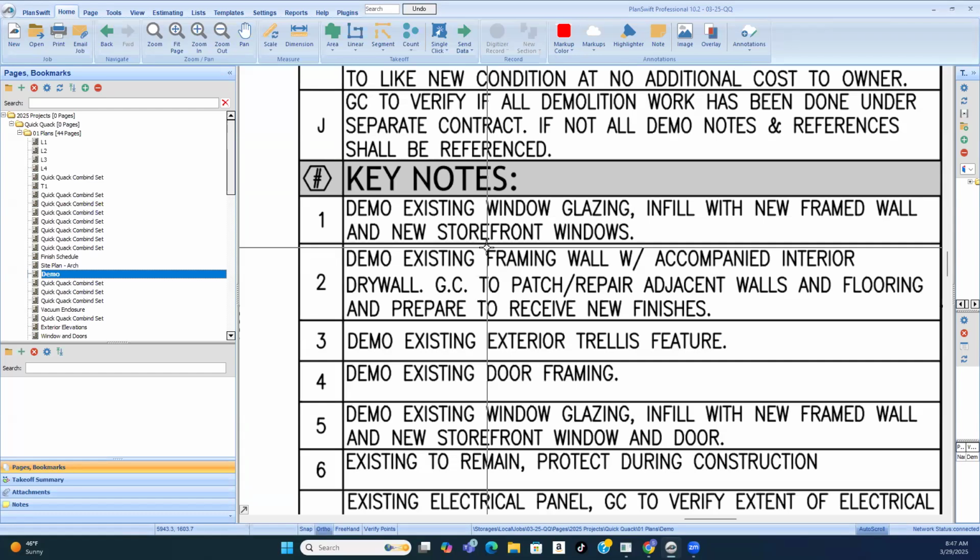The dowels, basically, that's what they call it. You have to dowel the whole perimeter of that cut, so you stick them out to where they go through the old and through the new. Look at you, you know how to do that. I told you, hey, I'm the construction queen.